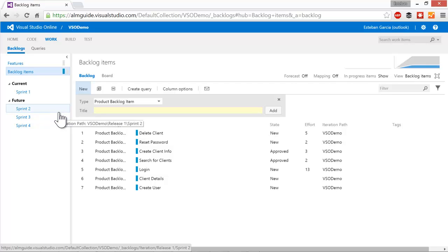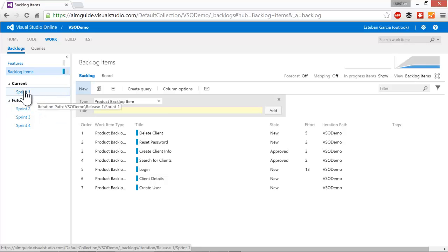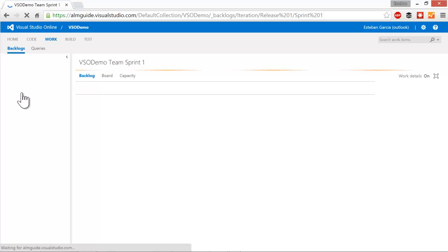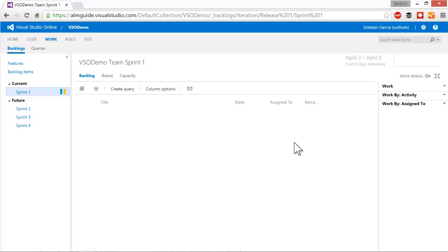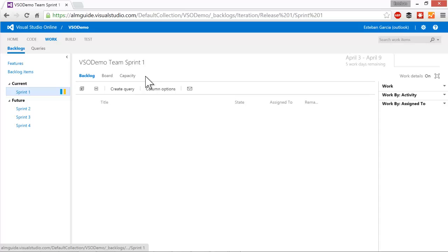Once that is in place, I can start bringing stories into my sprint. But before I do that, I need to know what my capacity is for this sprint. How much time can my team devote to working on tasks for this sprint. To do so, I'm going to click on sprint one and that takes me to the sprint one backlog. You see there's some tabs at the top, backlog board and capacity. We'll cover the backlog and the board in a second, but let's focus on the capacity section first.